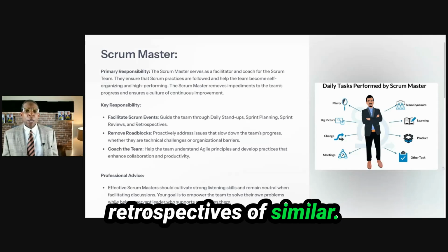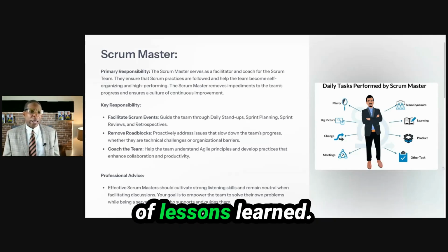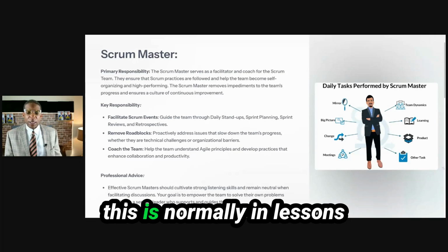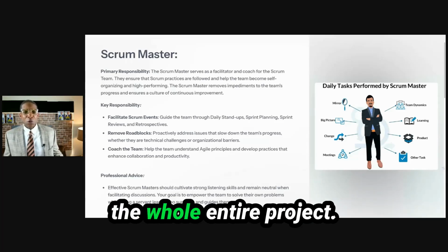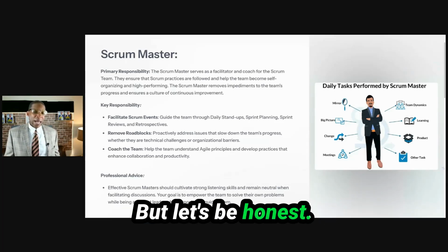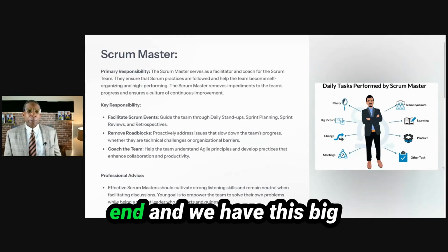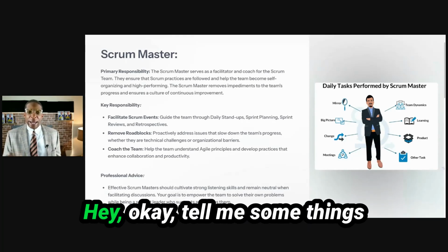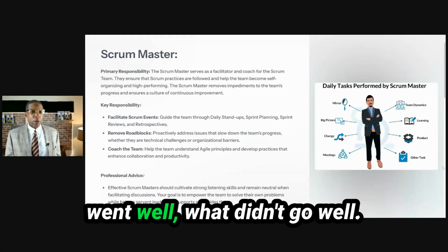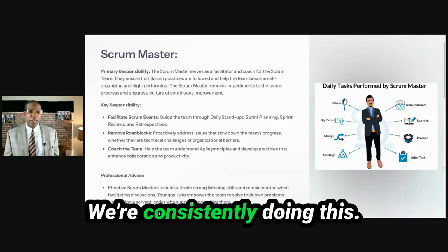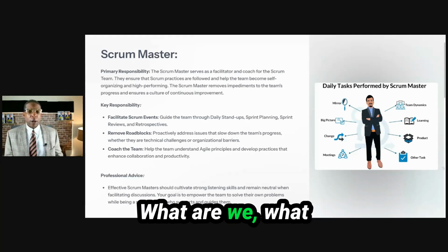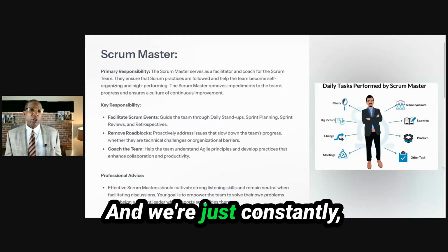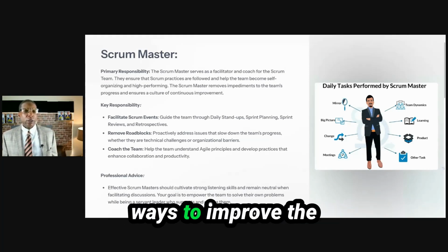Retrospectives are similar to lessons learned in the project management world. But the thing I love about this is that project managers are supposed to do lessons learned throughout the whole project, but let's be honest, a lot of times we wait until the end and have this big formal meeting, saying, tell me what went well, what didn't go well. Here we're consistently doing this. So the retrospective is looking at ways to improve faster. How can we get better? What are we doing wrong? What are we doing right? We're constantly looking for ways to improve.